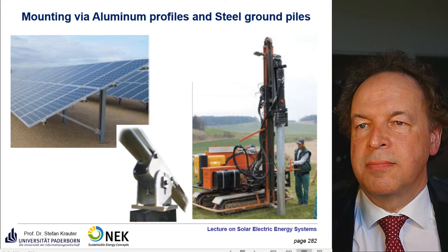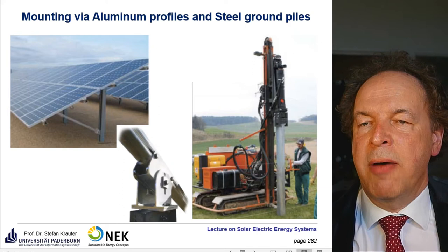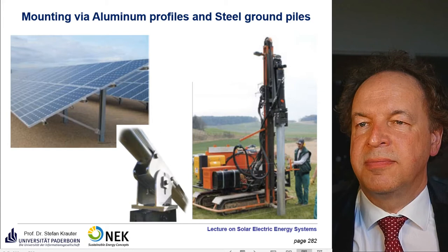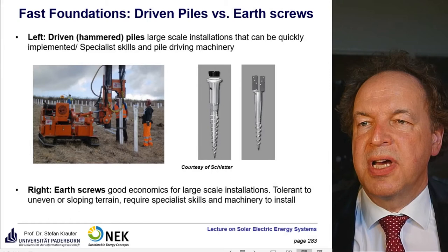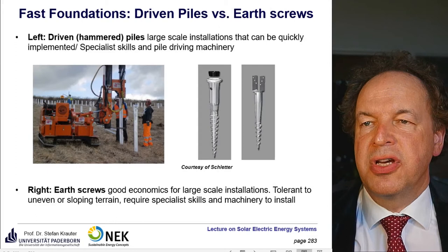This is a more modern one with aluminium profiles, so either hammered or screwed in the ground. We see a short movie about this shortly. And these are the screws, the earth screws. They make it also very efficient to install. Sure, the material is more expensive, but you save a lot of money for installation, for installation time, basically.